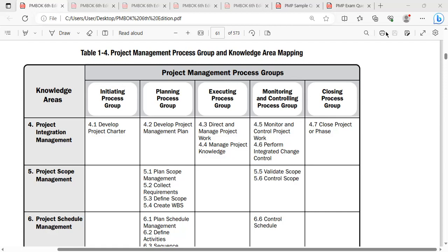So make sure you know which stakeholder has a key interest in your project, which stakeholder does not have an interest, which stakeholder has power and which does not. What kind of stake do they have in the project? Without the stakeholder register, it is very difficult for you to identify all this. Once you do this, you will plan your communication strategies in the communication management plan, and the stakeholder engagement strategies in the stakeholder engagement plan. So the stakeholder register should always be up to date.